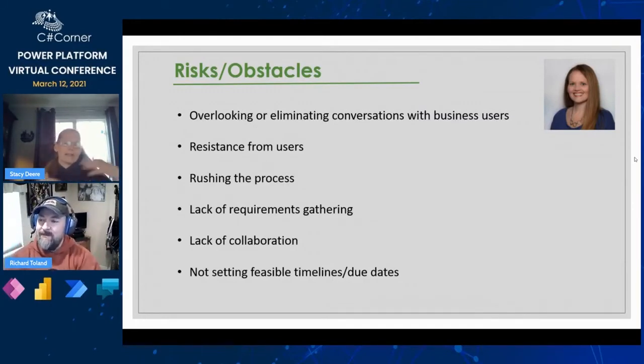Risks. Everybody gets a little excited as they start working on something new, but just remember, just because you think you know, you may not. So rushing the process, you're like, oh, I can knock out this next phase because it just works this way. Remember, hold up, don't rush that. Make sure you're having the proper conversations and it's documented and signed off before you hit that next level of the development. Otherwise, you've got a lot of rework you're going to have to do, and that's back on you, but it causes issues with the project and with keeping that relationship with your users.